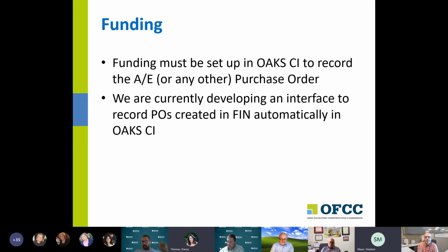One question I do have on the project initiation form: it asked for the project budget. Are you asking on that form only for co-funded, or are you wanting co-funded and project agreement LFI, or everything you have at that time? I think we want everything you have at that time, because that's the money that you're going to manage in OCI. Okay, because I was confused. I was thinking the project initiation was only wanting the co-funded amount. No, we would want everything that's going to be managed in OCI.